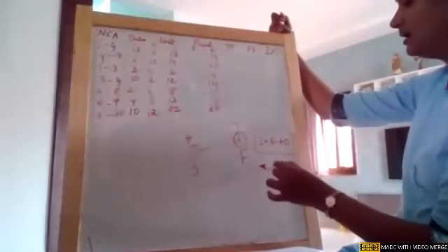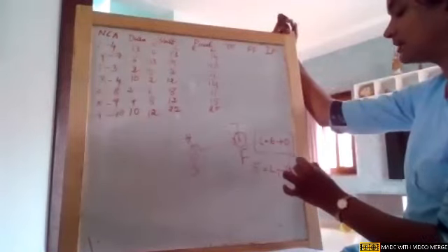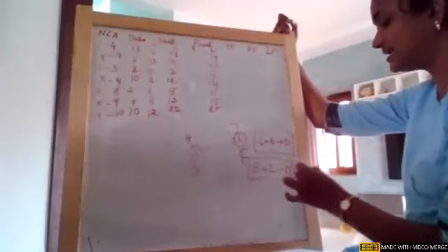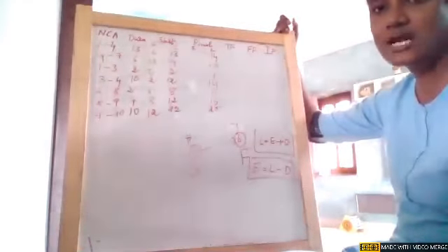Same formula, in order to find out earliest, how does it get reversed? Earliest is latest minus duration. The same formula, you're just going to subtract the duration.